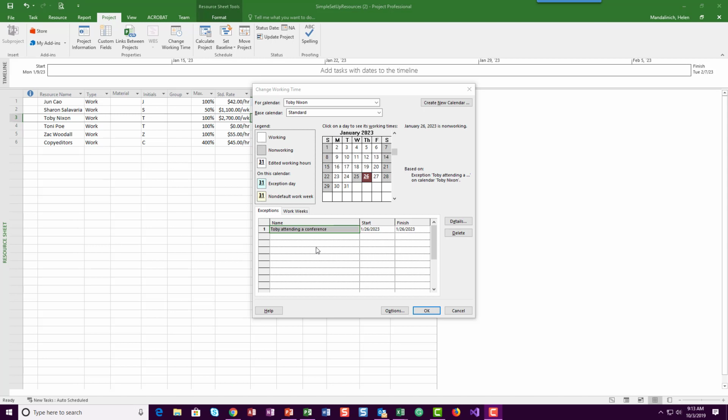All right, so then we want to change the default work week to a 4x10 work schedule. So that's 4 days per week for 10 hours per day, Monday through Thursday. This June, maybe June, I'm not sure how to say the name. I'm so sorry. She's going to work from 8 to 7 with noon for the lunch hour.